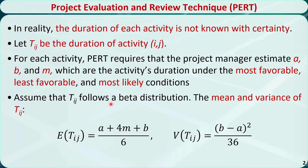PERT requires the assumption that tij follows a beta distribution. The mean or expected value of tij can be approximated by the duration under the best case scenario, plus 4 times the duration under the most likely scenario, plus the duration under the worst case scenario, divided by 6. This is a good estimate based on experience. The variance of tij can be approximated by the duration under the worst case scenario minus the duration under the best case scenario, squared, and then divided by 36.